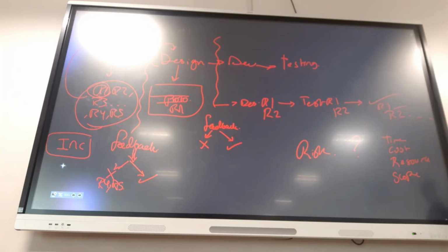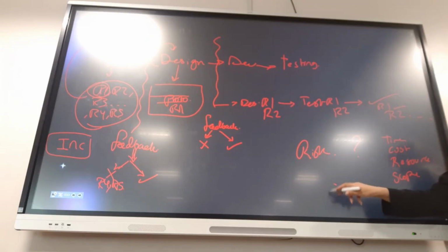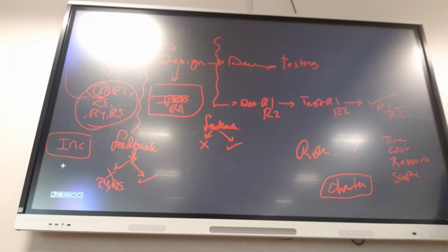You will see, inshallah, when you move to the project management course, I think in 4th year, there is something we call a charter. Remember when we talked about the planning phase? After we plan, we come up with a document called a charter. It has everything we can possibly agree on in all our previous meetings. We sat together, let's say for 10 meetings, we came up with that set of requirements, and we're all good to go. I put all of these in one list, and I asked the customer to sign on it.